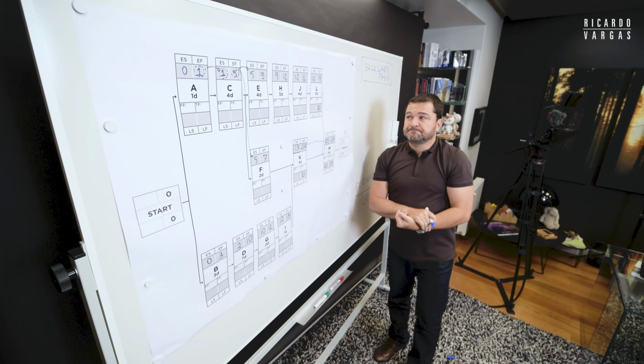Okay? So I'm doing, remember, late finish is late start plus duration. So late start is late finish minus the duration. So it's easy like that. Late start. So what I'm doing is this: 25 minus 4, 21. And then what I'm doing, I'm moving this late start to the late finish of the task that comes, what? Before.